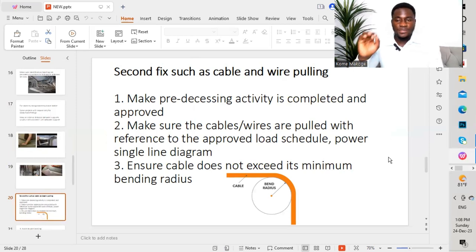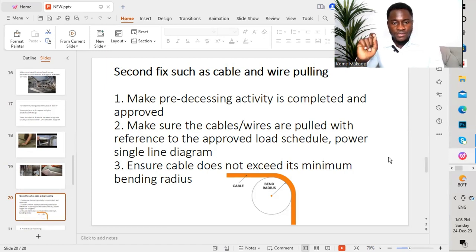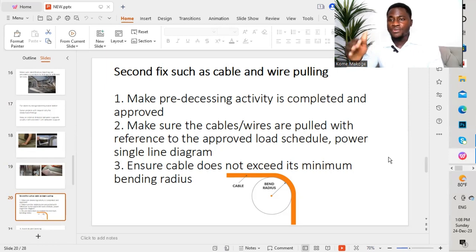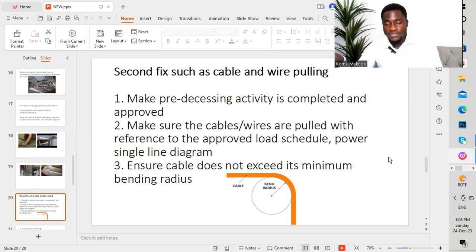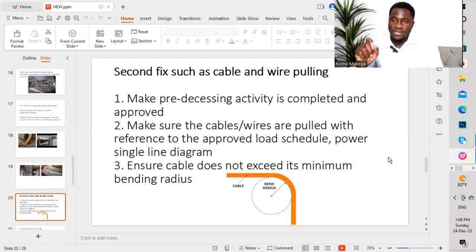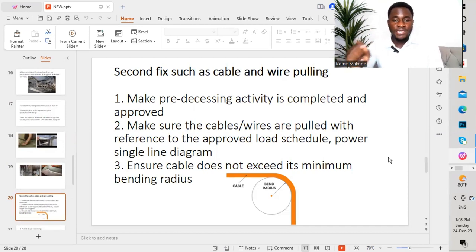For the second fix — while finishing with the first fix (which is not limited to what was mentioned) — we now move to the second fix, such as cable pulling or wire pulling. The first point: make sure the preceding activity is completed and approved. For the preceding activities, we go back to the activities that should finish for our current activity to proceed. So before you proceed with cable or wire pulling, you need to finish with the first fix, which is the conduit (PVC conduit or GI conduit), cable tray, trunking, or cable ladders. You need to make sure the first fix is approved before moving to the second fix.